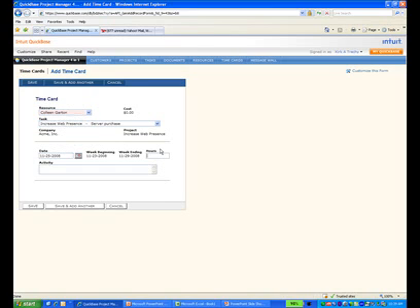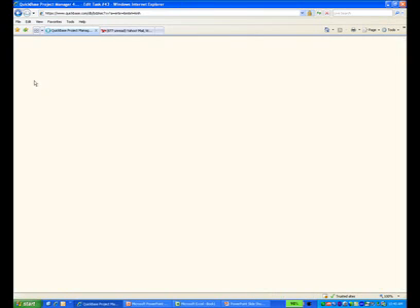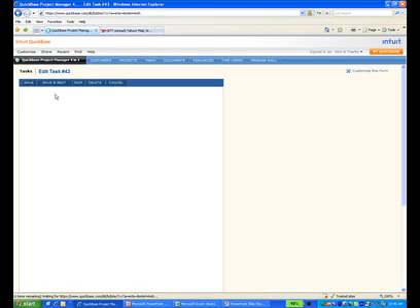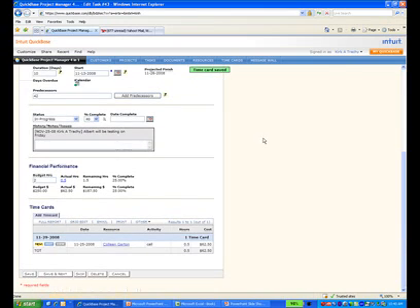You can put in here that maybe it was a half-hour telephone call, and we'll say save. You don't have to keep track of those details there. If you ever want to just right click, you can remove them. But we now have a time card reflecting down here that a call was made. The budget of 2 hours has been retired, has been changed by a half hour here remaining. But you see the date stamp and the person stamp of who made some notes here.